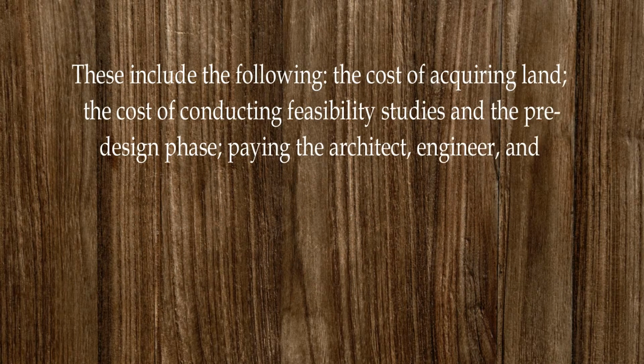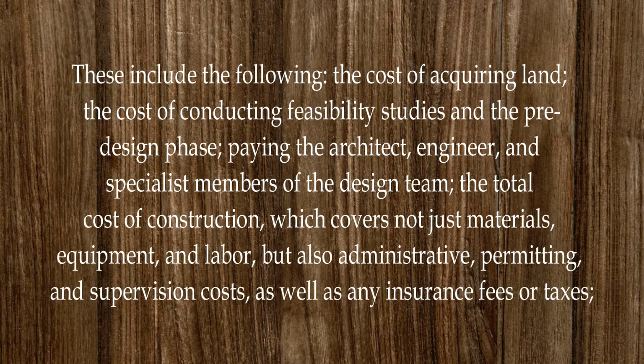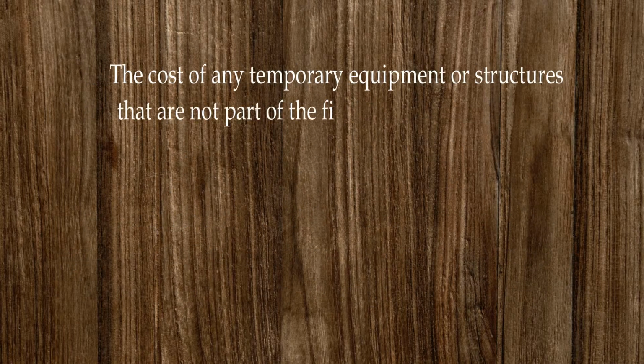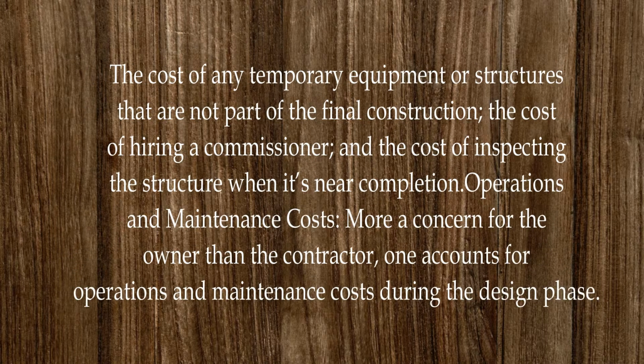These include the following: the cost of acquiring land, the cost of conducting feasibility studies and the pre-design phase, paying the architect, engineer, and specialist members of the design team, the total cost of construction, which covers not just materials, equipment, and labor, but also administrative, permitting, and supervision costs, as well as any insurance fees or taxes, the cost of any temporary equipment or structures that are not part of the final construction, the cost of hiring a commissioner, and the cost of inspecting the structure when it's near completion.